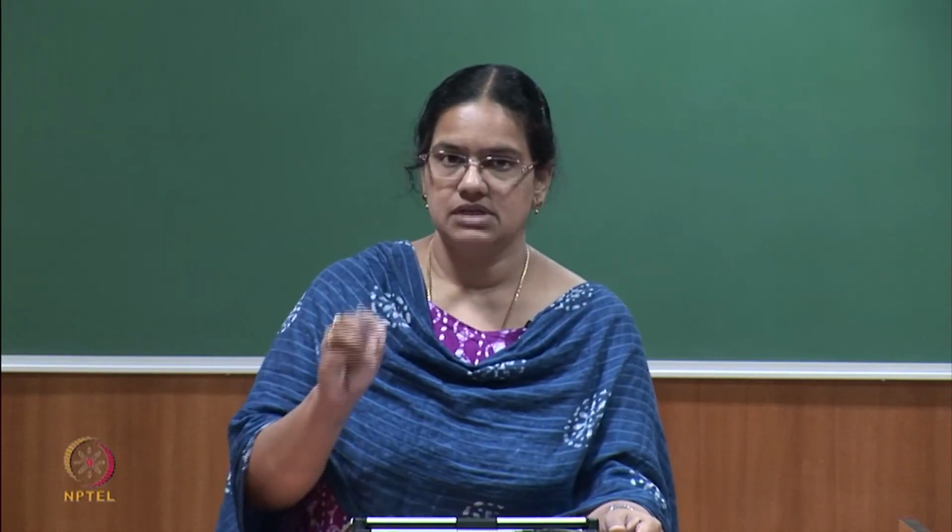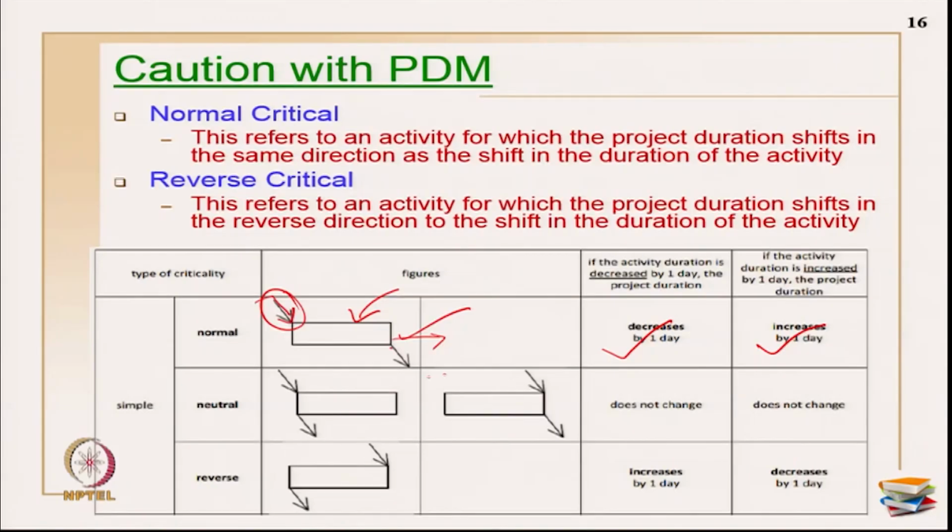So, when you are trying to map the relationships, you should be very careful about which of these cases you land up in. You have to be cautious, and this analysis applies to contiguous execution only. In interruptible execution you will not have any issues with the same. Okay, this is a neutral case. In neutral, all the relationships will end on the start or finish, and those relationships will also start from the start or finish. It is like a one-sided relationship.